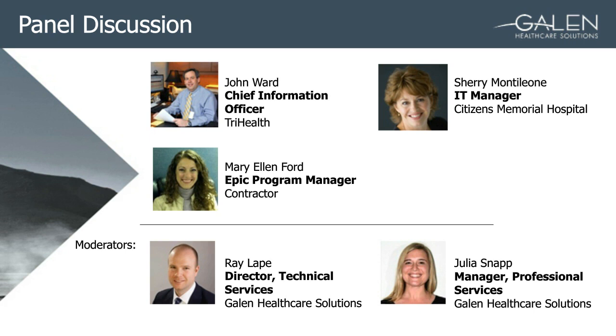We had the best lab clinical person, and we had the interface engine guy, and we pulled in the resources. While some people were working on lab mapping and bringing HL7 results in through that point of care interface, we had other people looking at the notes and figuring out what note types we were going to bring over. We had people doing patient matching. Everybody just kind of dropped everything and worked on this.